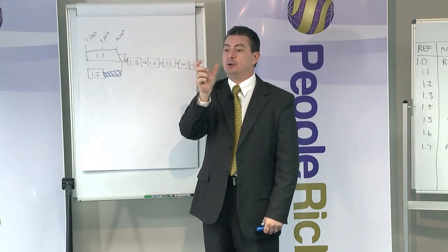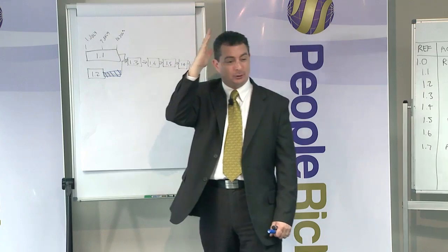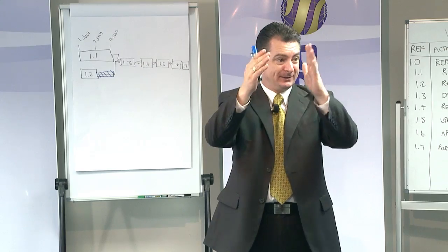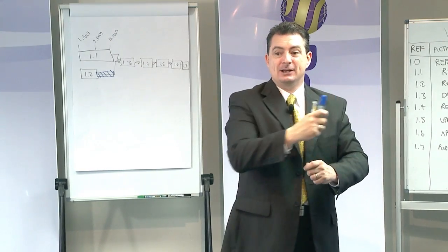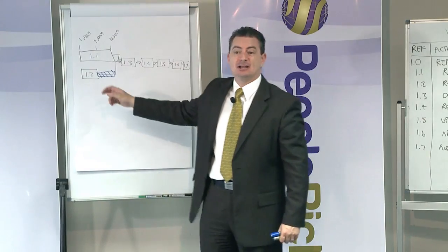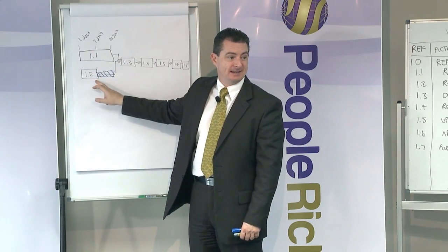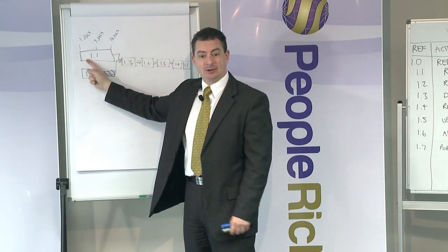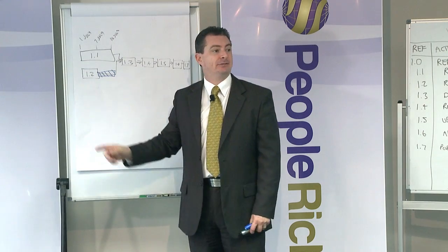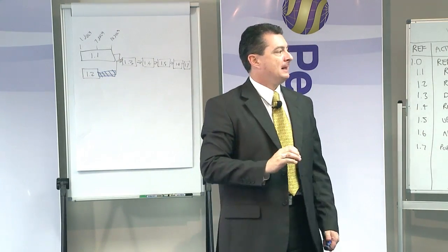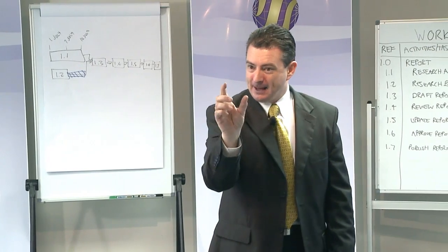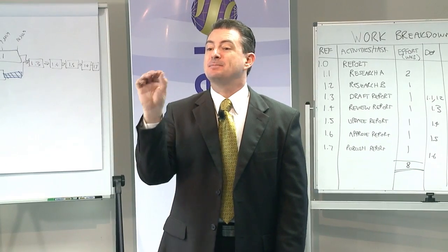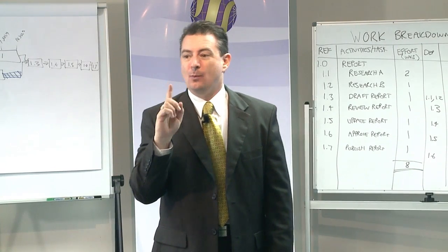Now, the reason why we move float is if I started everything when it could start, I would usually need a heap of resources up front, and we don't get a heap of resources and then reduce the resources. So we might come along and say, Todd needs to start 2 days on here and then come over to this task. So I might start this task on day 3. Does that make sense? Because he can do those 2 days, then come down to this one. So the float, what I want you to write down, float's where we've got a bit of time to play. Your aim is, anything that has float, your aim is to leave as much at the end as possible. Why?